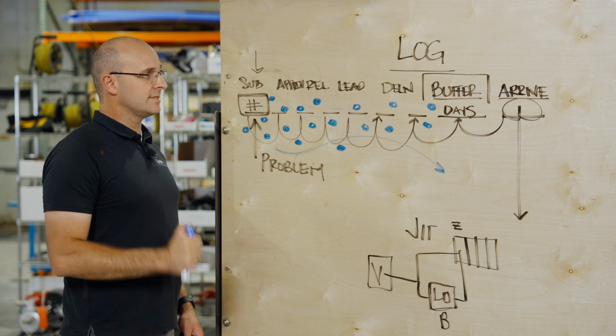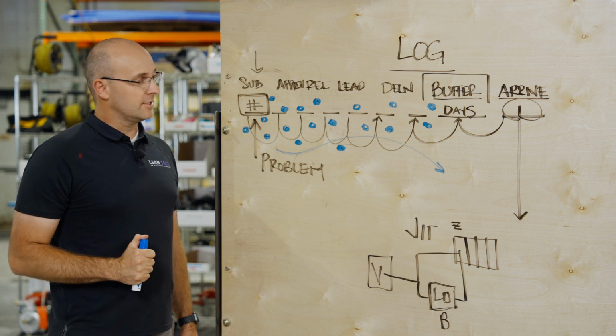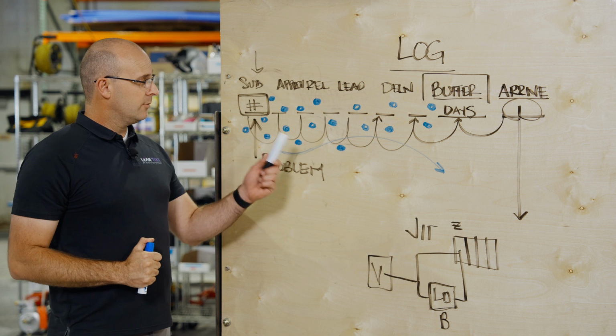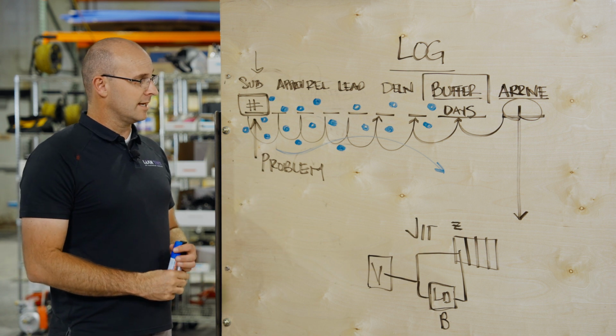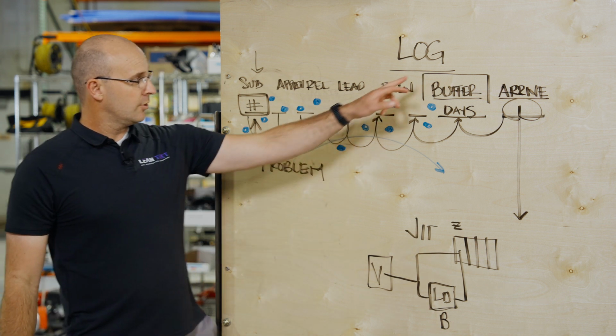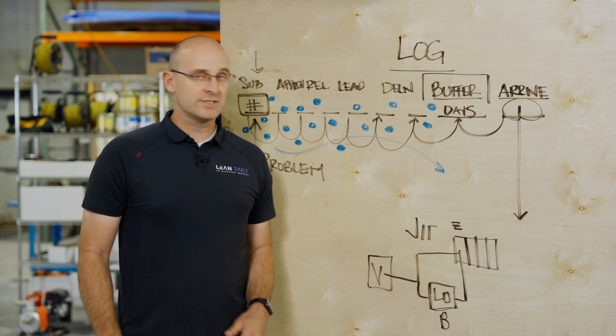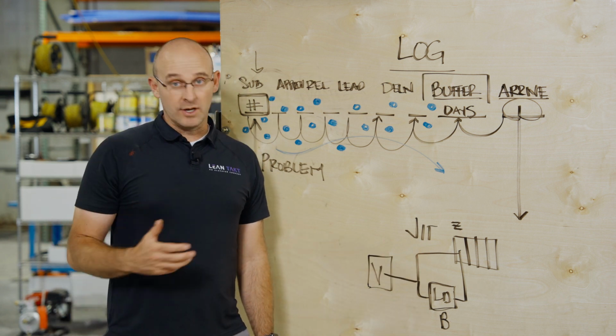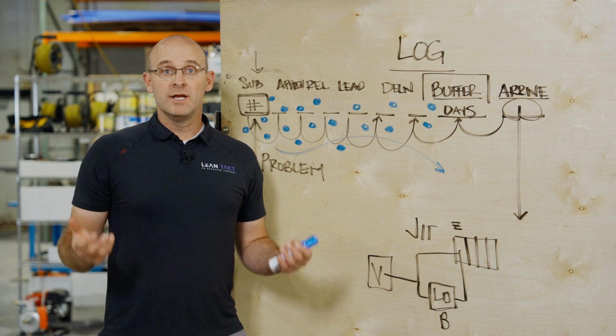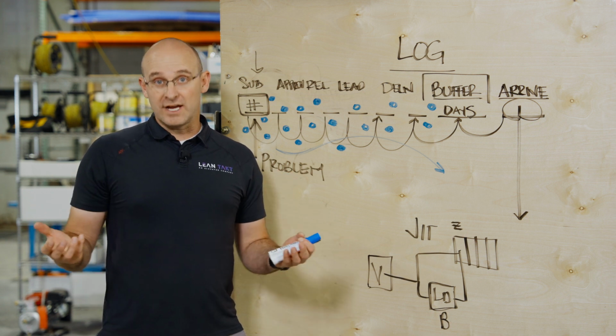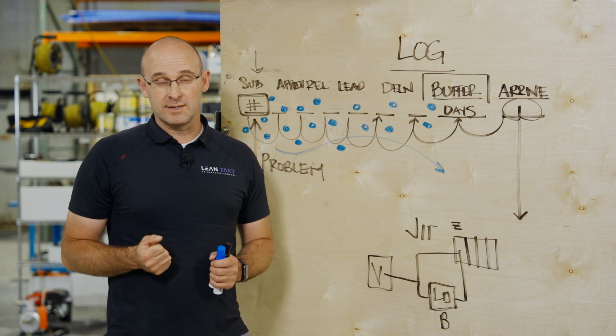I would never have a takt plan. I would never have a schedule without a procurement log and without actually being able to track these steps and to make sure that I know the buffer durations if I'm using a laydown yard, and like we always should, in just-in-time delivery fashion, meaning according to just-in-time deliveries.